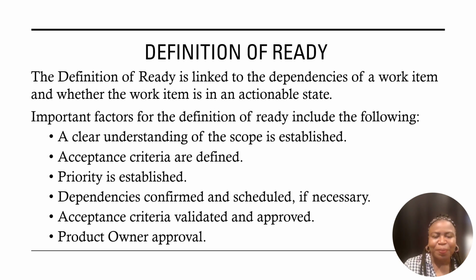And in sprint planning, you're working with the team to make certain that the user stories are in the correct format, that they've been sized, that there's a description of the work that needs to take place, and that the work item has been prioritized. But one key element that you also need to focus on is, does the work item, meaning the user story, have a definition of ready included?